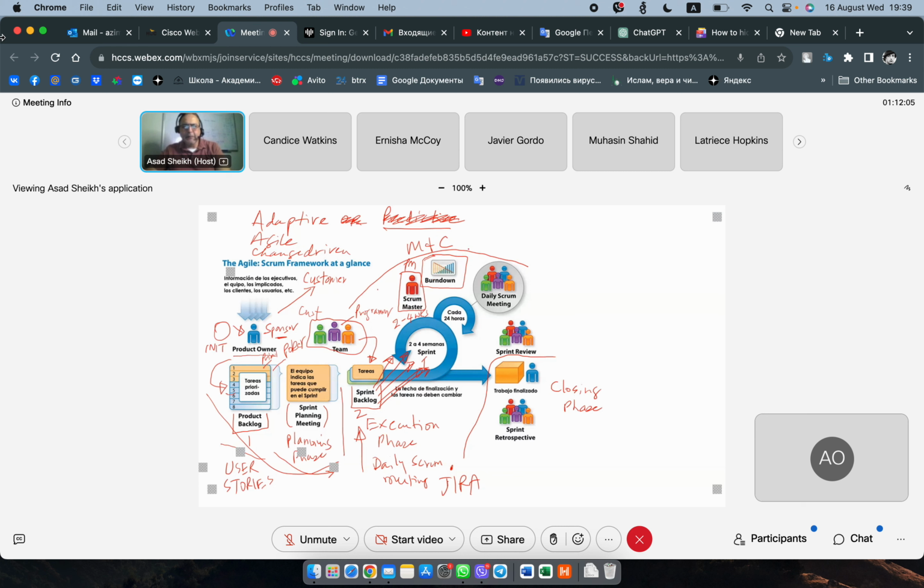And we look at these charts later on when we do the debrief 2 or the advanced version. Then we look at the burn down, burn up chart. So that's how he is monitoring and controlling, and these meetings are important. The sprint planning meeting happens in the planning phase, and then you have a meeting called sprint review. Very important meeting. Sprint review is like your validation meeting, where you validate that you're doing things the way you're supposed to.